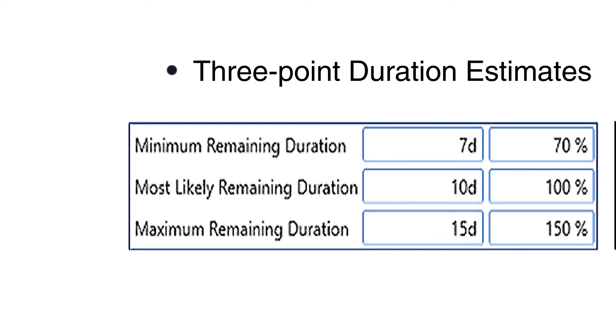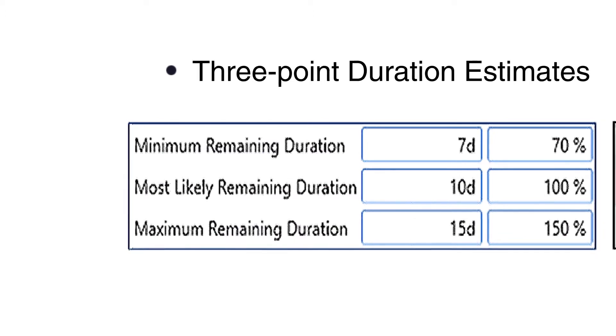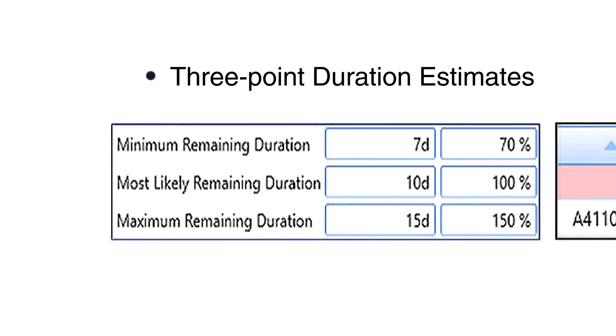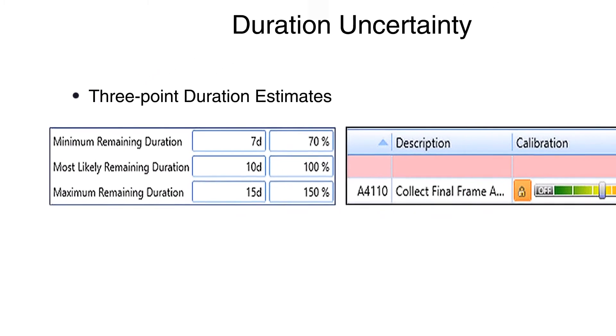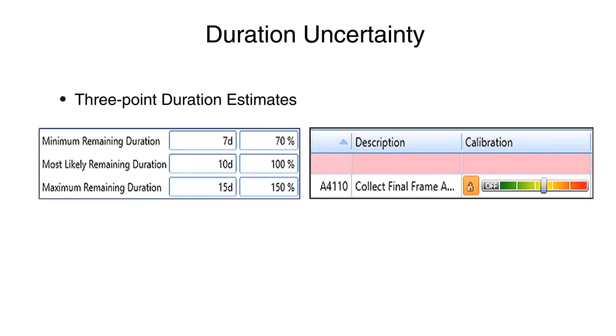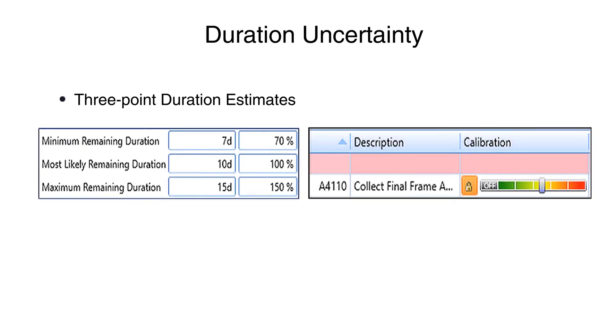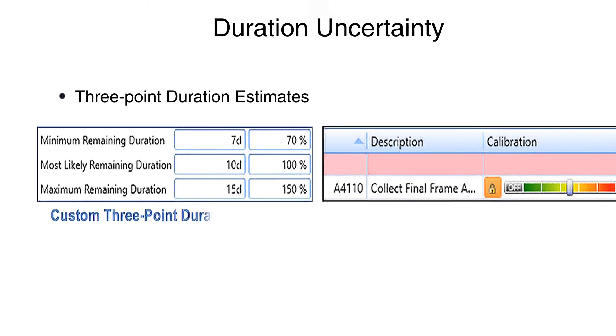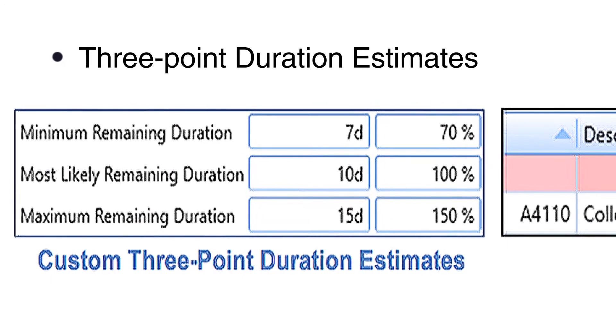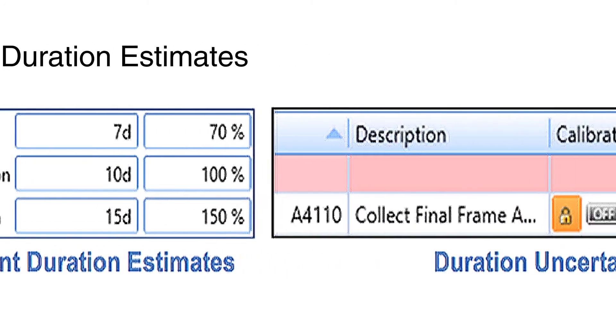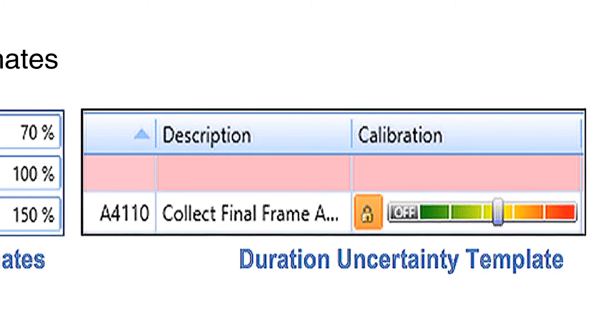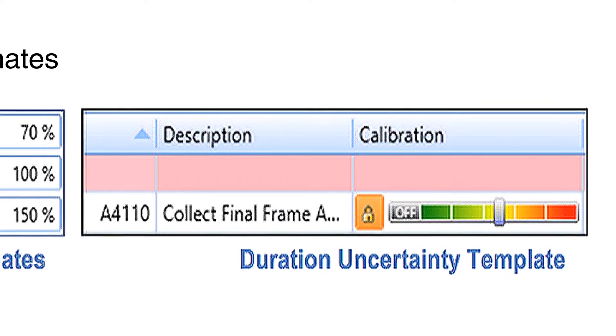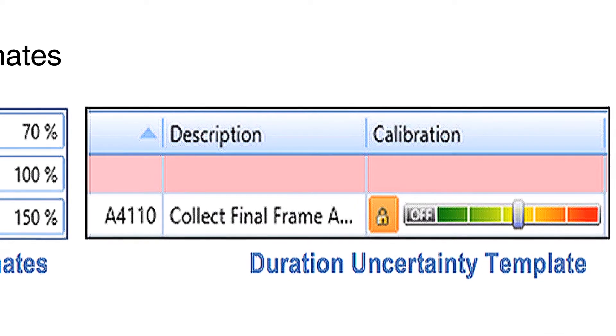At a minimum, this should be performed on all critical and near-critical tasks, and driving and near-driving tasks, supporting significant events. For larger Schedule Networks, it may not be reasonable to gather this type of information for every task. If custom three-point estimates are not available, templated duration uncertainty could be applied based on the type of work, the task owner, historical performance, or any other applicable task characteristic.